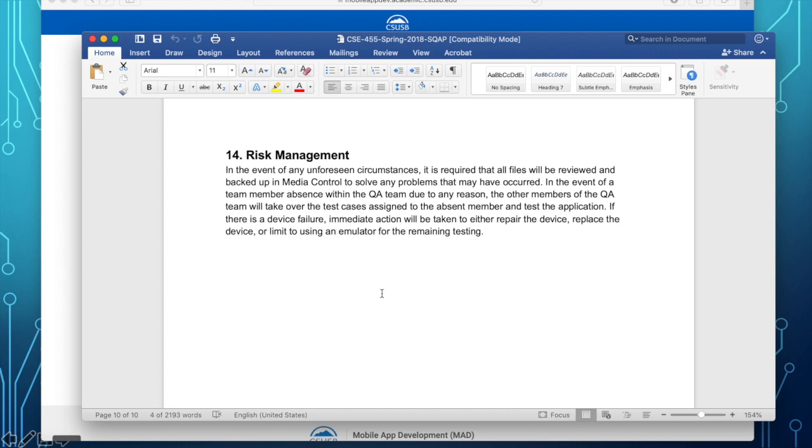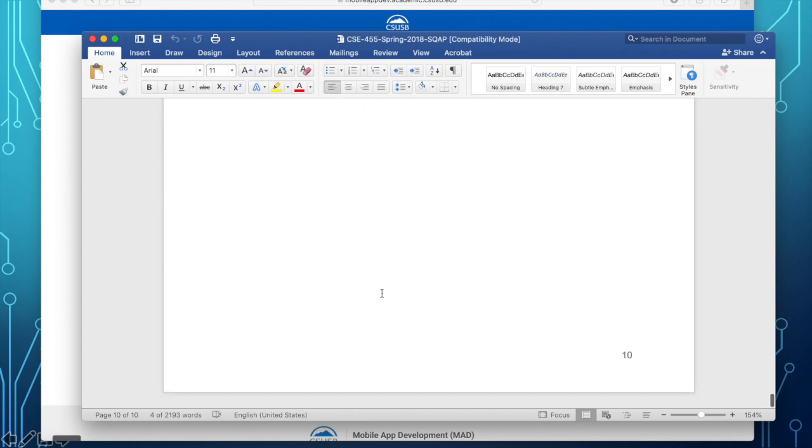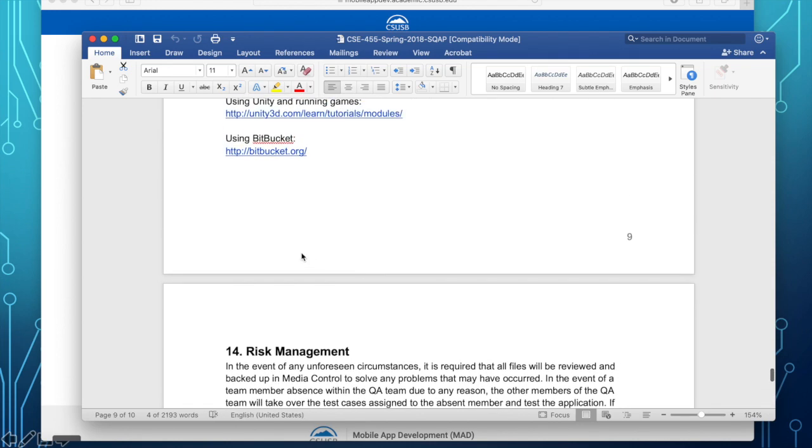So it's better to think about it now before that risk happens. Identify the risk that could happen. Say, for instance, one of your team members suddenly got sick, so what will you do? You have to transfer those tasks to another person. So the important thing is to identify it now, and then have a plan of what to do when it happens.